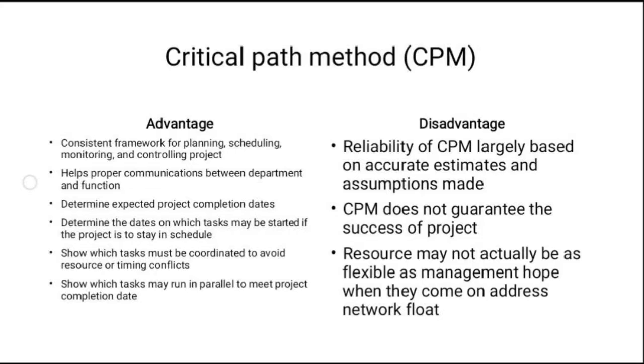Disadvantages: the reliability of CPM is largely based on accurate estimates and assumptions made. CPM does not guarantee the success of a project. Resources may not actually be as flexible as management hopes when they come to address network float.